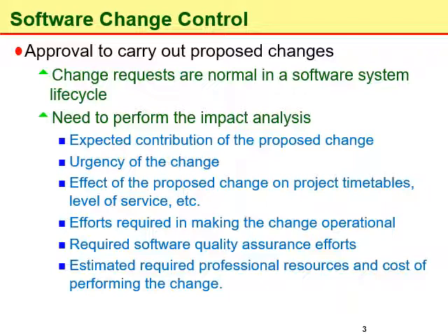This is necessary to determine because, considering the urgency of the change request, the project manager has to plan and mobilize the resources accordingly, because the development teams may be busy in other tasks. Therefore, having knowledge about the urgency of the change requests helps managers manage the process effectively.